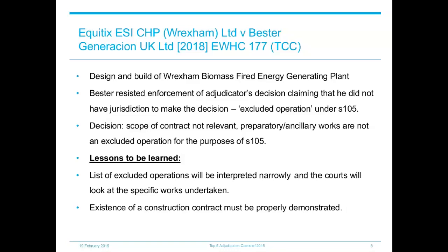A key lesson that can be taken from this case is that the question of whether an adjudicator has jurisdiction or not cannot be answered based on a construction contract as a whole. It is a particular part of the contract in dispute that has been referred to adjudication that's relevant, and the list of excluded operations will be interpreted narrowly.